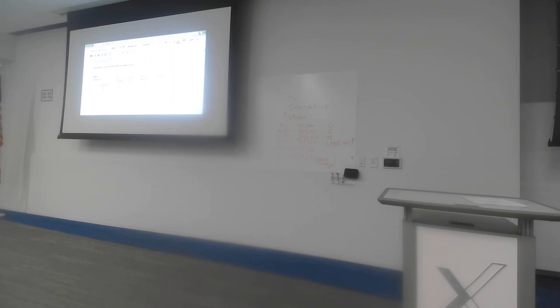I have to keep track of my paths as well. So I'm going to go down to my project paths list. Again, I'm going to list the activity that I crashed. Any of these paths that have C on it, they're all going to reduce by 1 day. So the critical path reduces from 19 down to 18 because C is on it. This path goes from 15 down to 14. This path has C on it, so that goes from 18 down to 17. This path has C on it, so that goes from 12 down to 11. And this path doesn't have C on it, so that stays at 15. We can still see that the critical path structure is still the same, that path here at the top still has the longest duration, A, C, E, I, and J, so it is still the critical path.